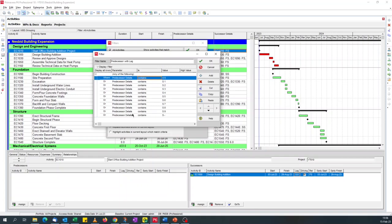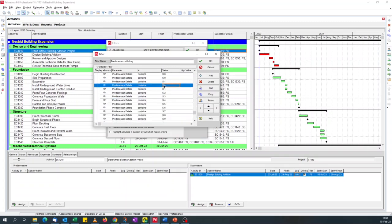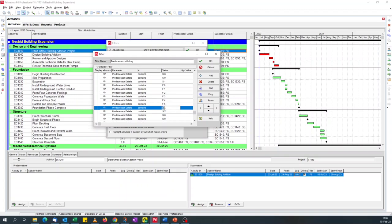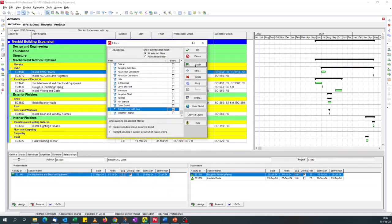So we've done predecessor details for SS and FS relationships. Now we need to do the same for FF and SF relationships. The easiest way is to copy all those conditions and paste them, then change 'S' to 'F' to cover FF and SF. Like I said, it's not pretty, but it's effective. The prettier way is to generate a report for lags, but this is the quick-and-dirty method. Click OK and apply.